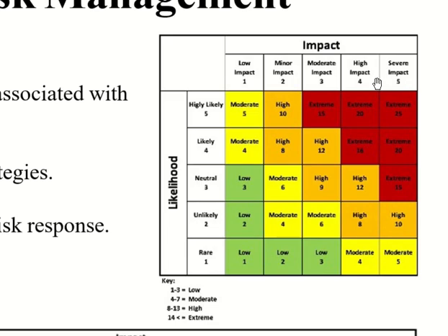So for every WBS activity, you can define the likelihood of its risks and the impact of those risks. If an event has high likelihood and high impact, so it is very likely to happen, and if it happens it will have a very high impact, then that risk will need more attention. You have to properly plan for it. But if either the likelihood is low or the impact is low, then you can maybe ignore those risks.